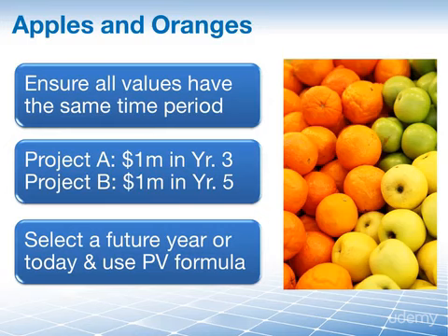So first you have to select a time frame and convert them from there. In other words, you either have to say, okay, how much is Project A worth in 5 years? And then you can compare Project A and B based on the 5-year time frame, or you say, okay, how much is Project B worth in 3 years? And then you can compare A and B on the 3-year time frame.